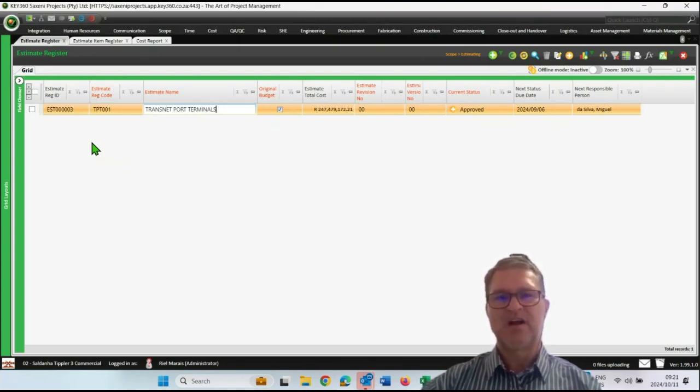And then contingency is literally, and sometimes on projects they actually use 10% of a project, which can be quite a big amount for contingencies, and that's literally things we didn't foresee, the risks that actually happen. But that's how we build in for risk. We build in fat. We call it fat in our costing, where we add a bit of money. We have a bit of money in a bucket. So if risks do materialize, we can fund the cost of that risk from the contingency cost bucket.